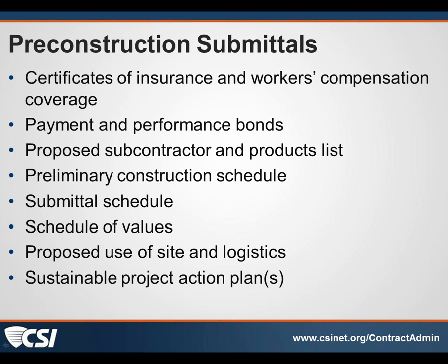Kevin further goes on to say, and it was something that I just mentioned, that the AE should look over the contractor's insurance certificates to ensure that the AE is listed as an additional insured in its endorsements. So when you get those documents, I would suggest that you do look them over and make sure that they are in the proper format.